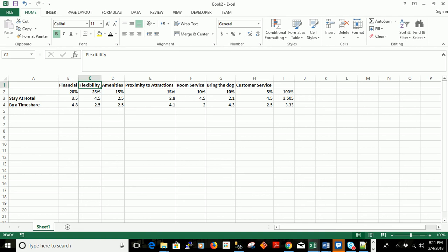But the bottom line is you should be able to look at a feasibility analysis, and the feasibility analysis should be able to defend the decision that was made as to which alternative was chosen early in the project based on some objective measure, and this is just one way to objectively measure that. Now, of course, my categories here are geared towards going on vacation, but in an information systems project, you would have your operational feasibility, your technical feasibility, the financial feasibility ranking, political feasibility, all the different feasibilities we talked about, whichever ones are important to you, and you would come up with what those rankings are as far as the percentages. And again, that's something that you could document and you can defend.